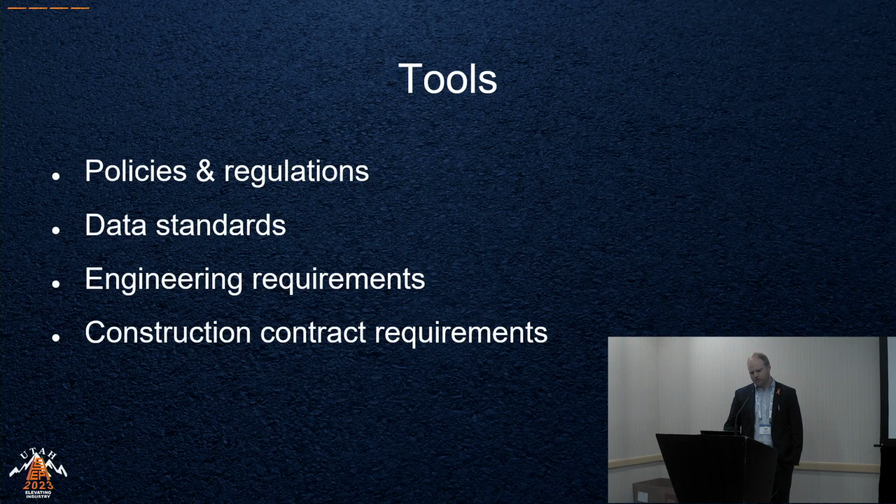So some of the tools: we've changed our policies and requirements. I talked about changing the UAR. We've tied the ASCE 75-22, which Richard will talk about in a moment, and the ASCE 38-22, which is the SUE standard. We've tied those into our statutes.